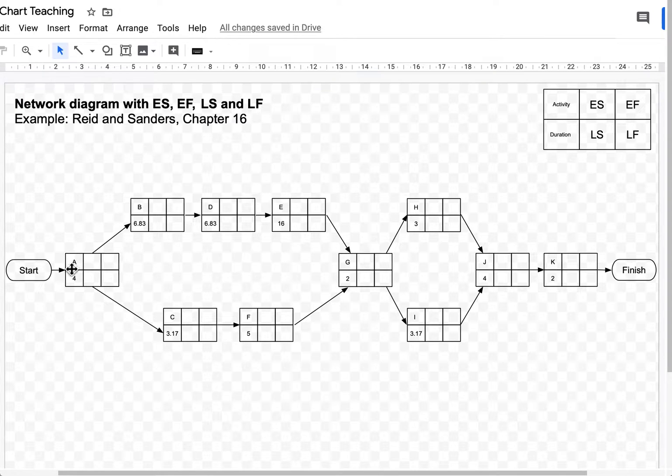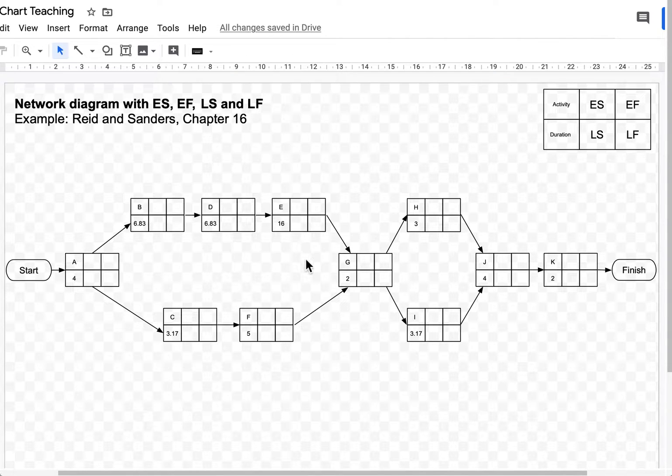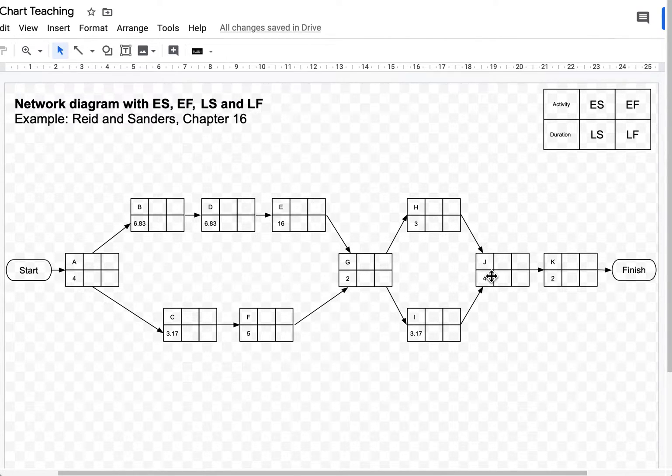This is the activity and this is the duration. And the forward pass will start from left to right, so it's moving from start to finish.